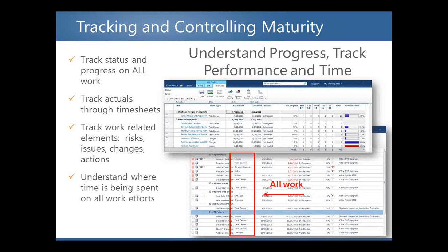And then, of course, what work do you want to track? Is there a requirement to identify and track changes in scope or other issues when project status changes? If the answer is yes, you may want to define attributes needed for a change request so project owners can easily adapt to those changes, and then, of course, adjust their costs, schedules, and resources accordingly. Do you have a requirement to track project issues, risk? Is there a requirement to track other work items that need to be considered that maybe affect your resources, such as service requests, action items, etc.?